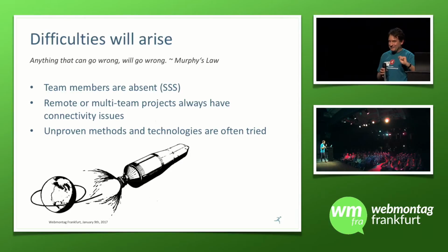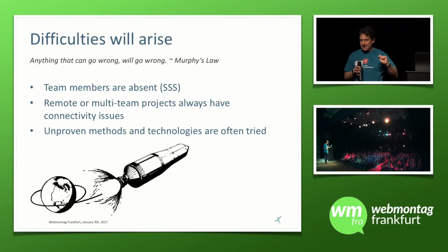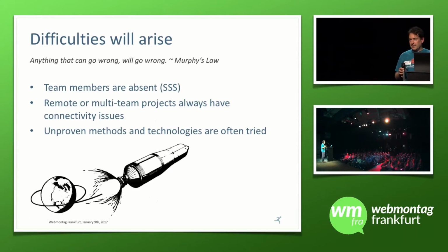And this is where I get a little bit mad at the developers and the project managers. Somebody comes up to you and he says, this project is going to be faster than all the others we've had because I have a new framework, we have a new technology, we have a new deployment system. It's going to be so great. Bullshit. It won't be. Because if it's the first time this is being employed, it will slow your project down. I guarantee it. Maybe the second project, maybe the third project, when you have enough expertise to actually manage this new technology, then you will reap the successes of it.